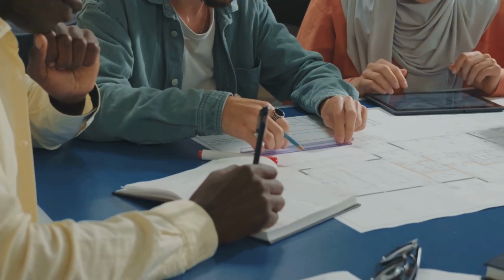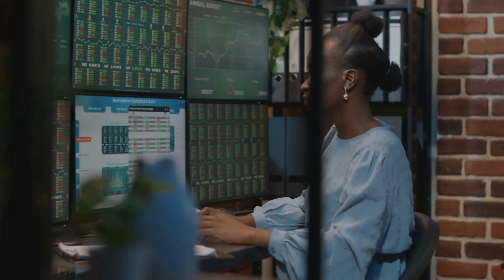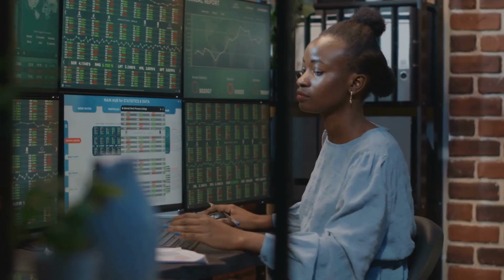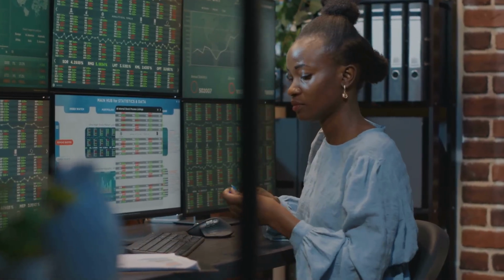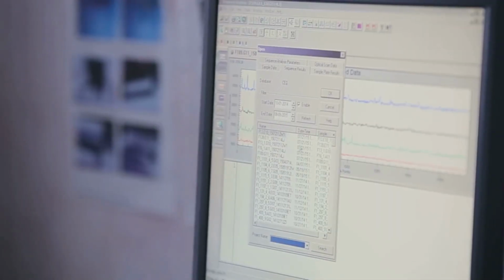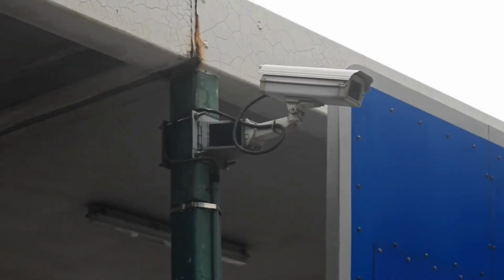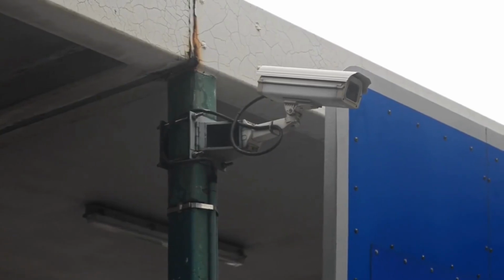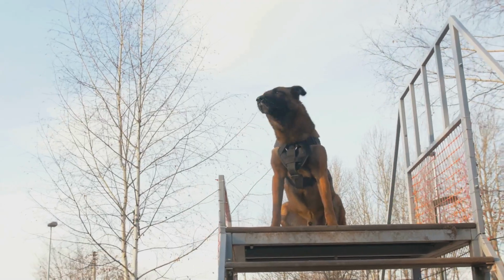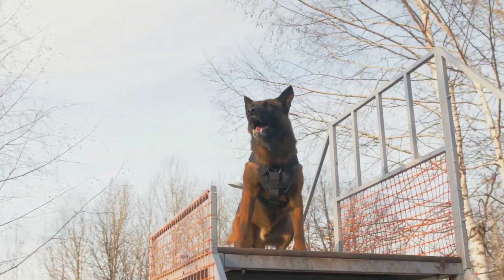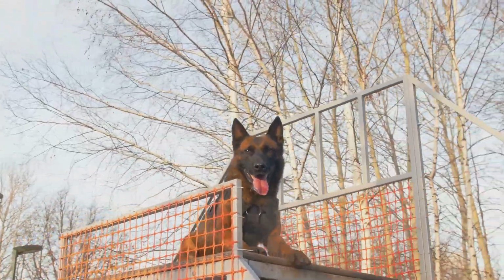Add detectability, how likely you'll see it coming. Third, assign an owner and a watcher. Fourth, capture assumptions next to each risk, and capture triggers too. Fifth, track controls across 3 buckets: preventive, fence; preventive, motion lights; detective, camera alerts; detective, neighbor chat; corrective and contingency, trained dog, safe room, whistle.